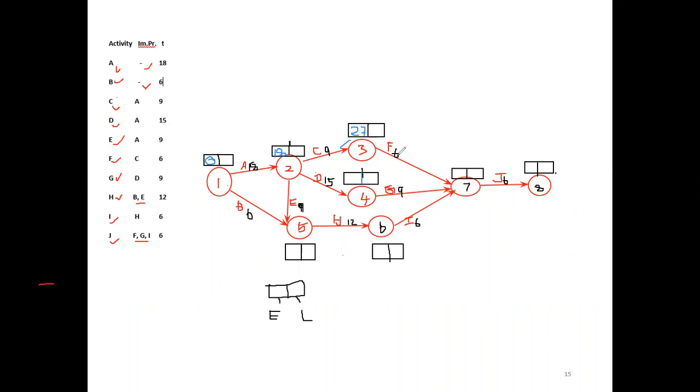Right, we can do it. Now, what is this? For the fourth event, only one arrow mark. From the second day, 18 days. For the second event, 18 days. Now, deactivated needs 15. So, for the fourth event, how many days do we spend? 18 plus 15, 33. So, this is 33.